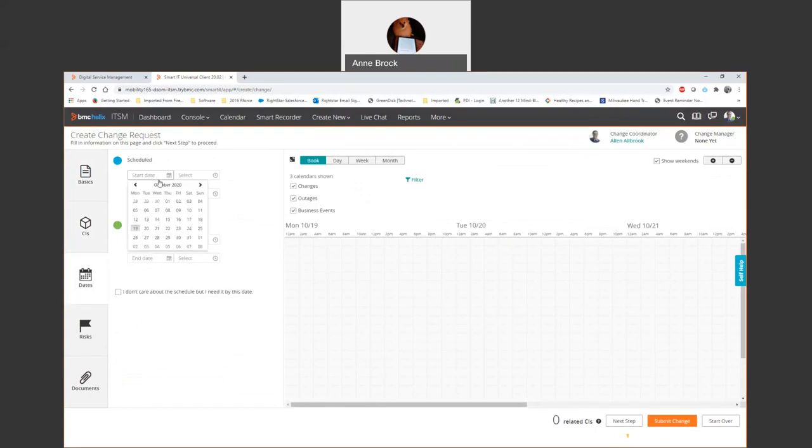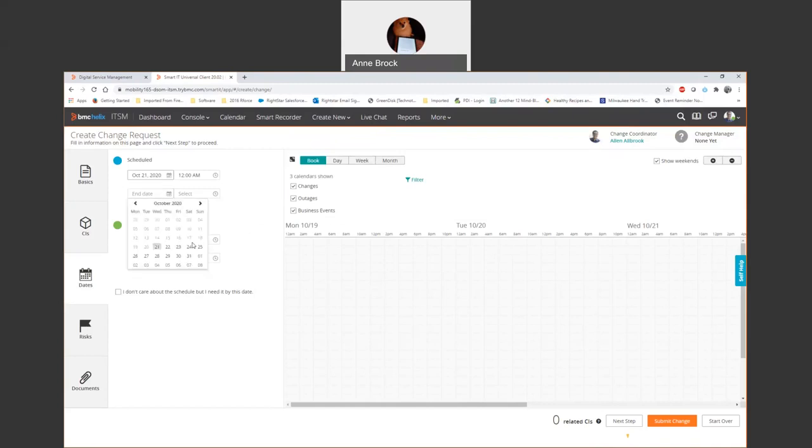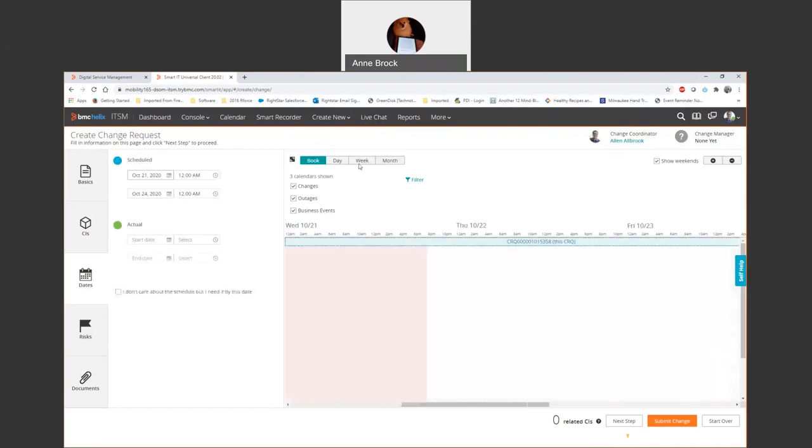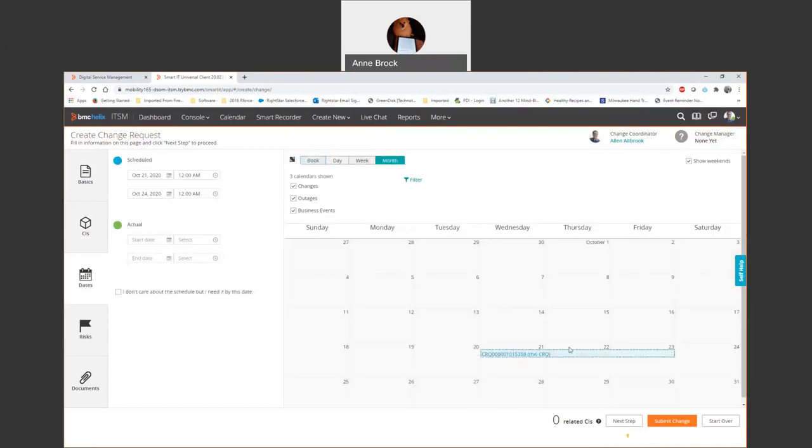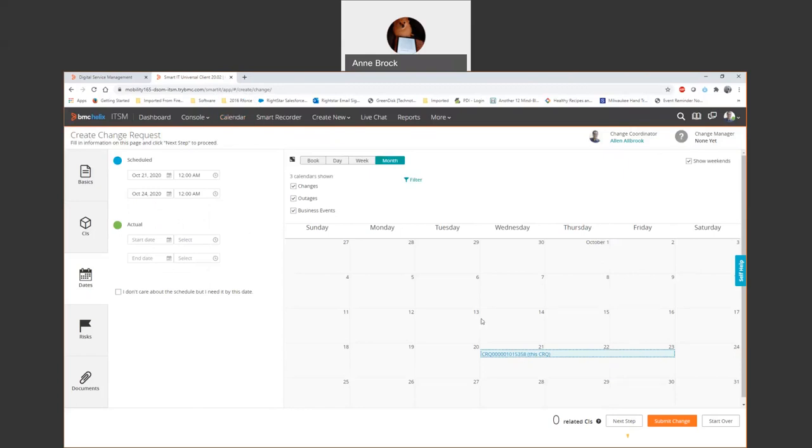This is an operational change calendar in the system. It's going to let you know what's going on. Let me put a couple of dates in here. Now I can see my change is appearing here. I don't have any change collisions. If I did, I would be getting an alert notice over on the left so I could see there is a change collision. Change collision is when there are two changes against the same asset that overlap start and end dates. I don't have any, I'm good to go. I can keep moving on. If I wanted the full calendar, I can open it up. This is really just so I can see what's going on right now so I can start getting my change into the system.